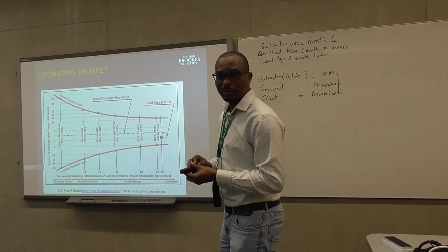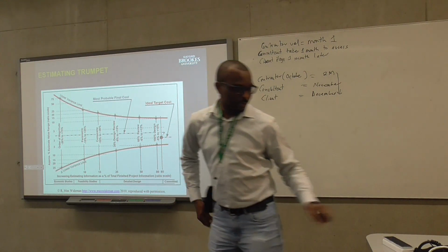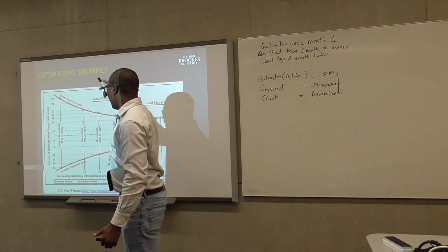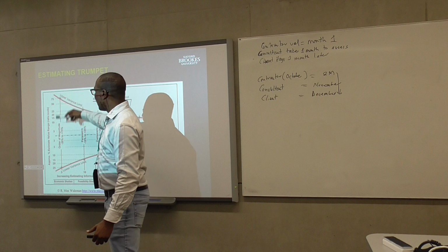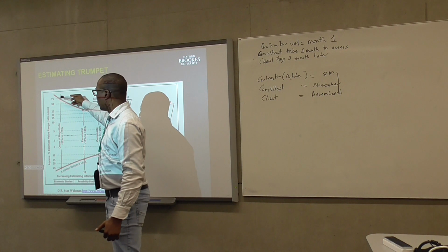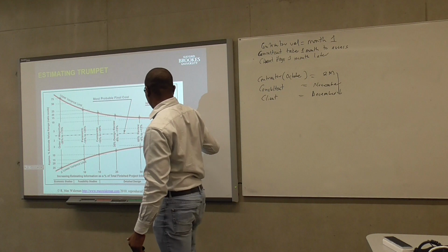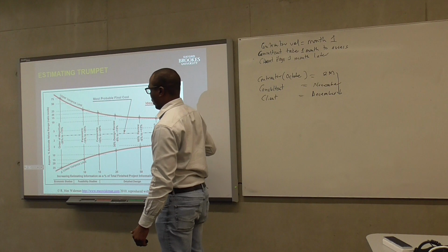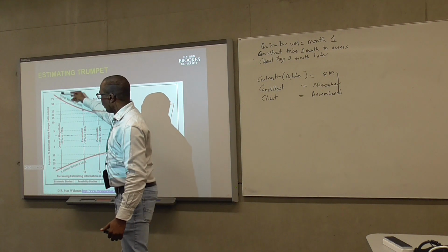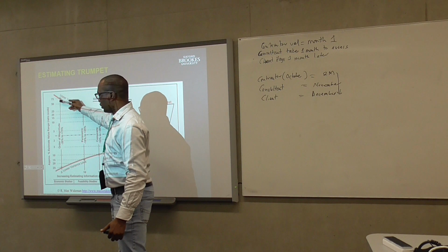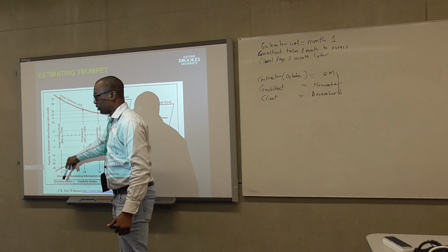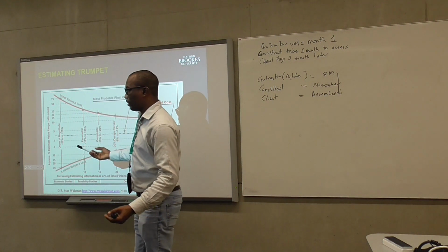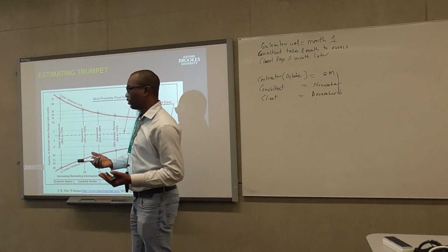So the cost estimate, that's varying. What happens in cost estimate is that when you start, and let's say your drawings are, especially at the economic or feasibility studies, the variance is very wide. So if this is your actual or your ideal cost on target, when you start in, the variance between the actual and what you estimate, especially at the feasibility stages, is very wide because you have very minimal details. Because you probably are just making use of conceptual drawings or schematic design.